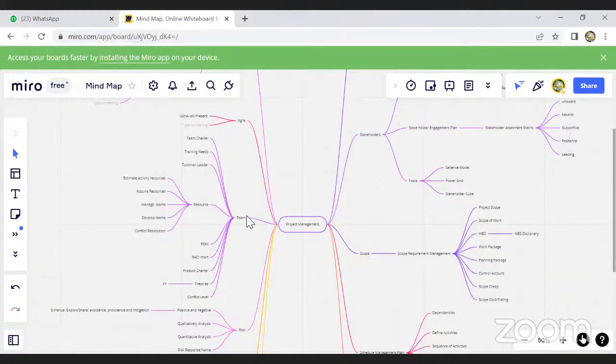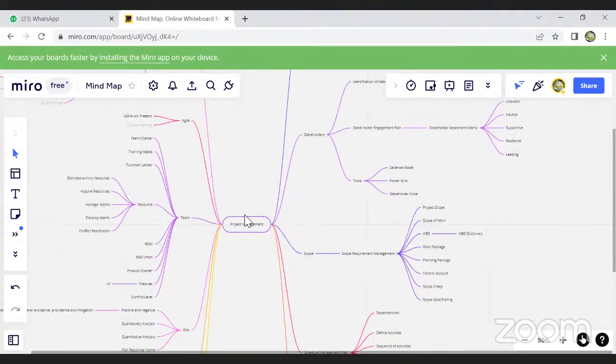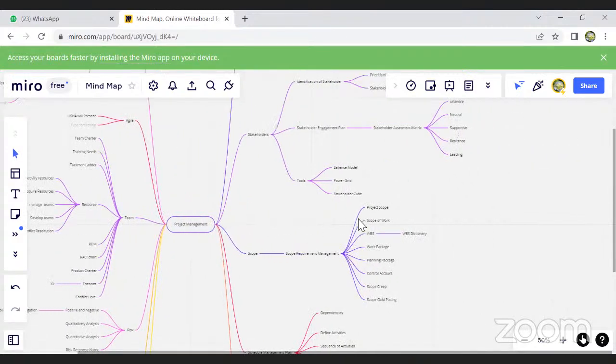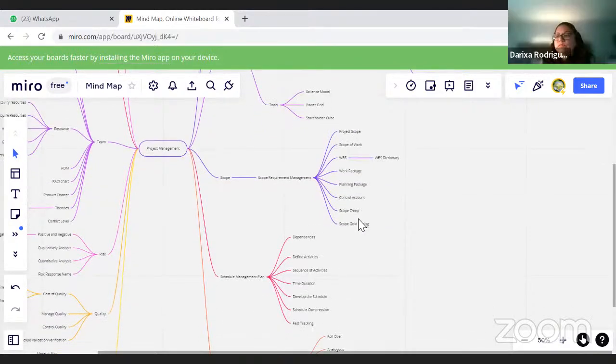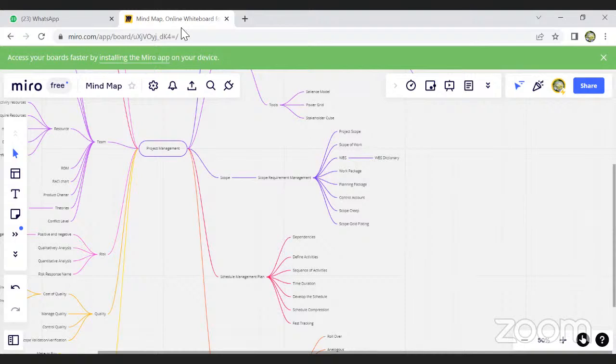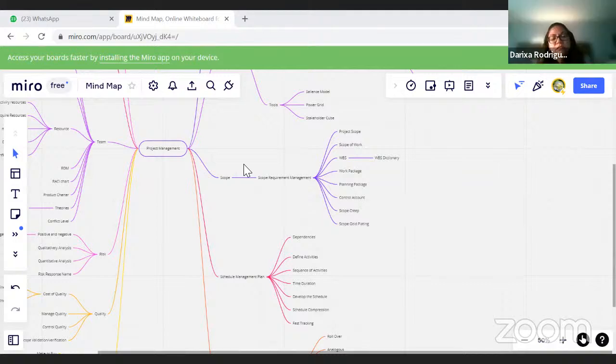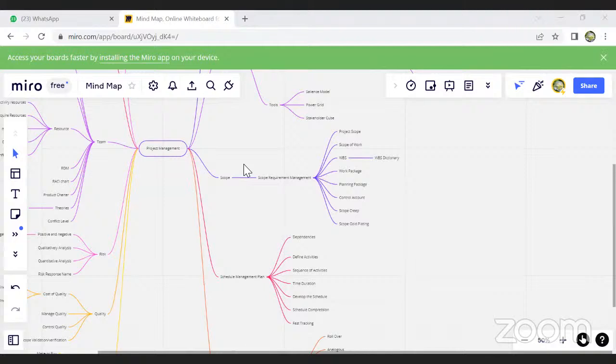In scope management, we first learned about the requirement management plan, in which we had requirement documentation and the requirement traceability matrix, which is an Excel-based file in which we define relation, purpose, and responsibilities. In the requirement management plan, we have important and non-important requirements, out of which scope is filtered, and then the project scope statement of work is defined.